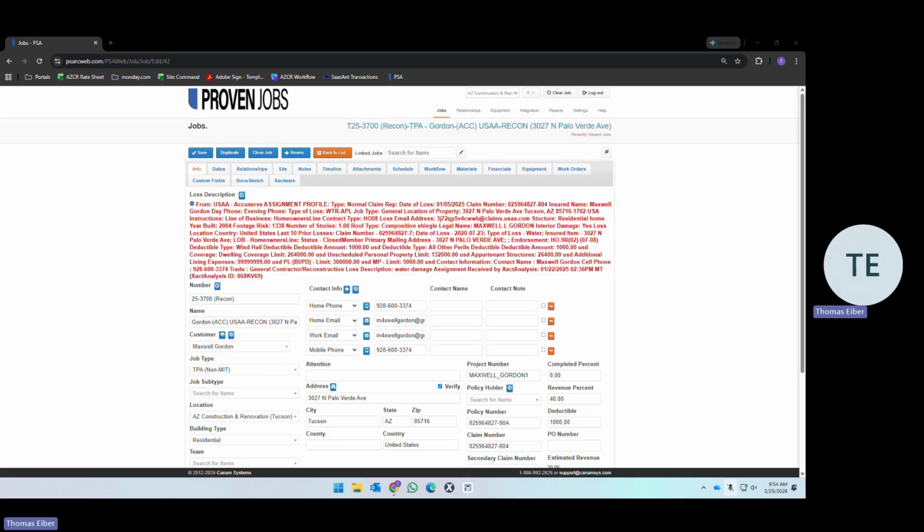Weekly, you are also required to follow up with PMs to determine their job and task priority. So the weight of the jobs, the weight of the different workload that your project managers have needs to be taken into account as new jobs are being assigned. If a job is closing, that opens up that project manager to receipt of a new job of similar workload. Just do your best to balance that so that one project manager is not weighed down with too many jobs.